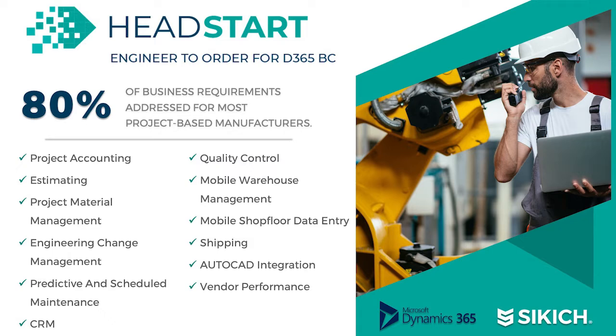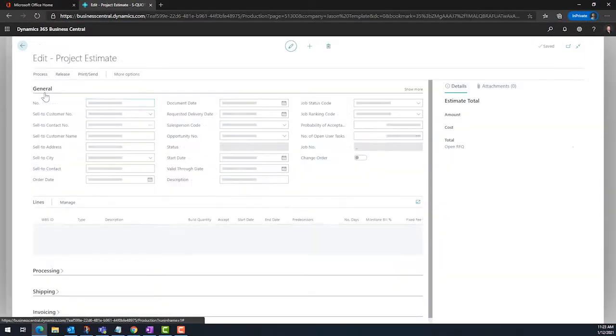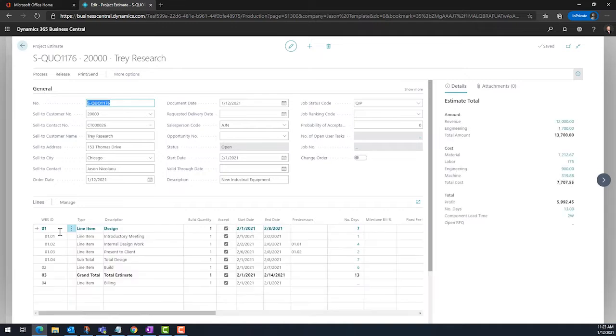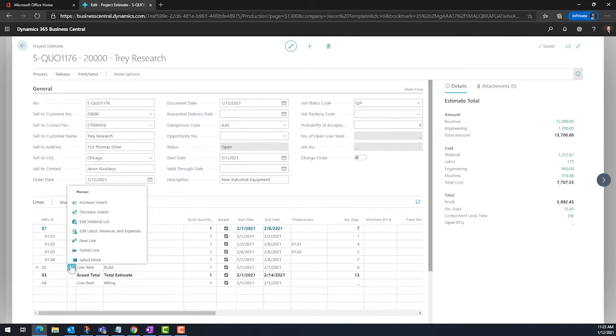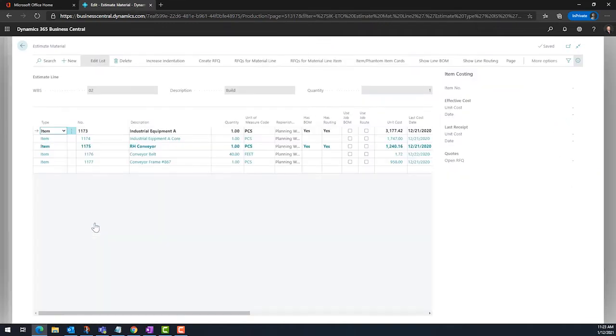In this episode, we are going to take a look at managing vendor requests for quote. Head Start for ETO empowers users to send inquiries to multiple vendors for either goods or services and to track those responses. Acceptance drives to the estimate and ultimately accurate costing.